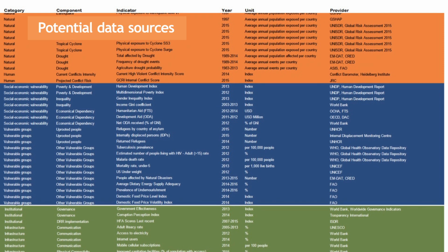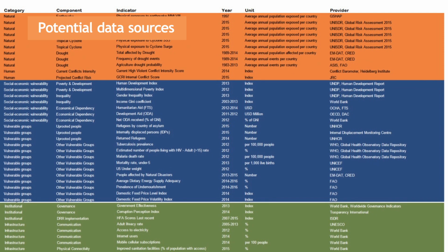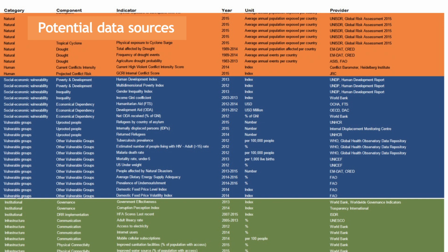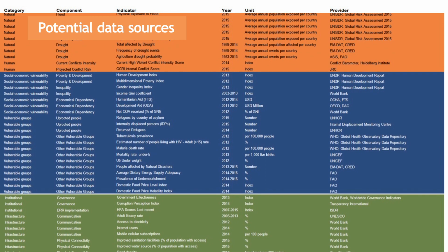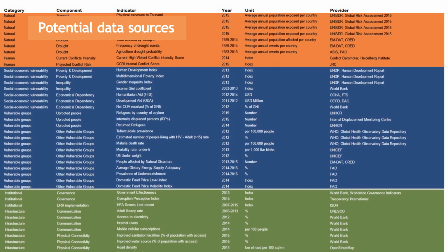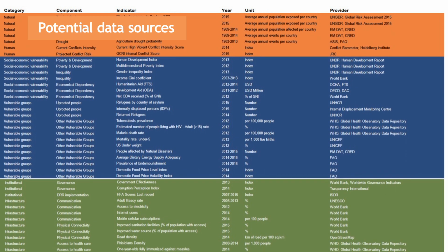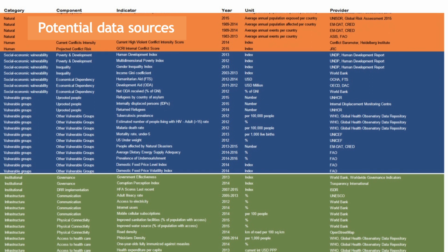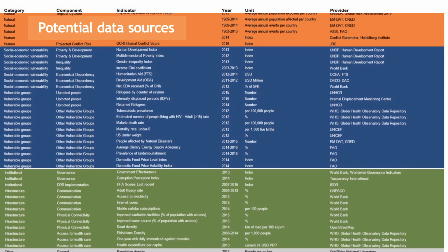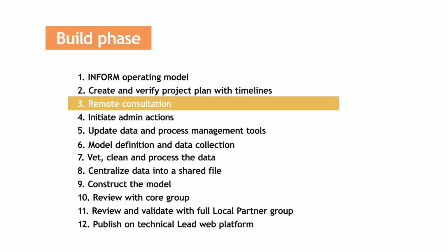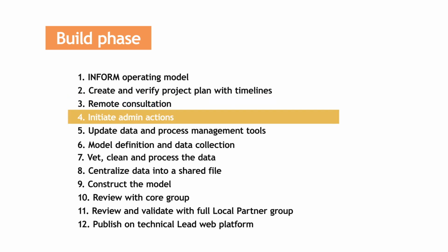Take time to investigate potential data sources for the model. Don't expect that they will all magically appear from most partners during the process. Experience shows that most of the data comes from the subnational lead and a few key operational partners. You can often identify pools of data and get access well in advance of the data collection workshop that we talk about later.